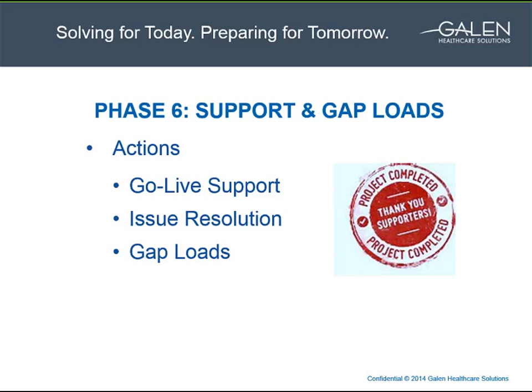At least one big consideration when working out the plan for the gap loading of data is how accessible the data is to the technical conversion team. In one of the conversion projects I'm working on presently, there's a tertiary vendor involved with the data extraction, and so this has a somewhat limiting effect on the gap load possibilities. Sometimes there might even be a fee involved for clients with multiple extracts. So that's yet one more thing that needs to be talked about: what's optimal for these data extractions and subsequent gap loads.